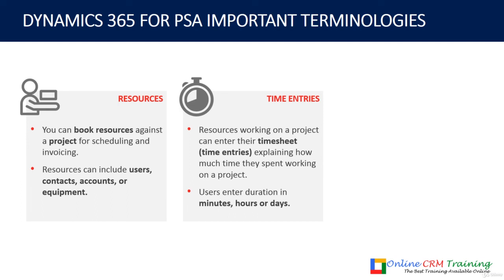The next is the time entries. When your users or the resources start working on a project, they spend some time, right? So they need to keep track of their time, how much time they are spending on a particular project or an activity. So they enter their timesheet, which has time entries in Dynamics 365 and which can be approved by the manager, right? So number of hours, how many hours they have worked in a day for which activity, those details are defined. So you can define it in minutes, hours, or days.